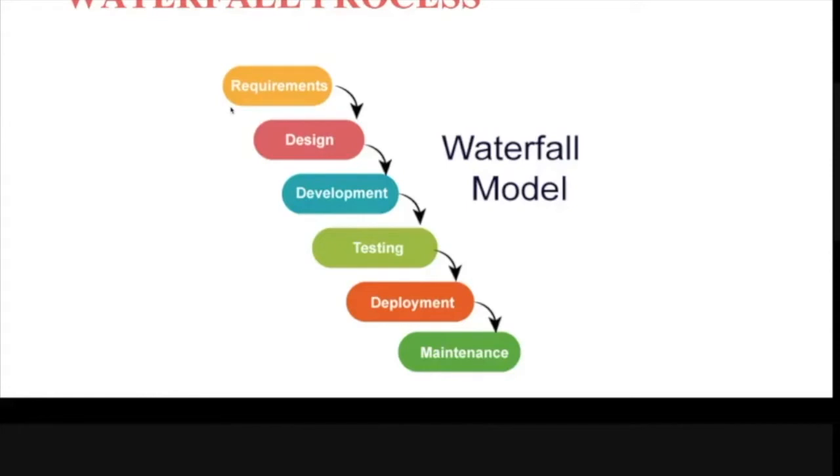Next step is analysis. This is the second stage. The system is analyzed in order to properly generate the models and business logic that will be used in the application. Next is design. The design phase details any requirements such as interface, data process, and physical requirements needed to implement the project. These requirements are defined in a design specification document. Next is coding or development. Source code is developed based on the requirements. The system is commonly built and tested in small units. Units are integrated, and then the entire product moves to the testing phase.